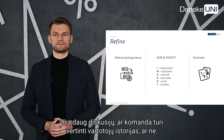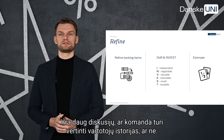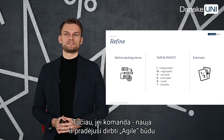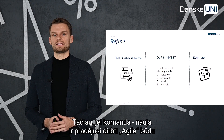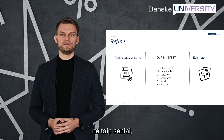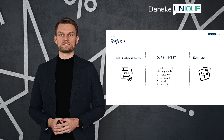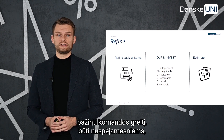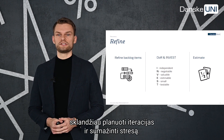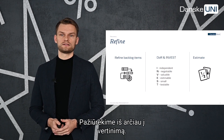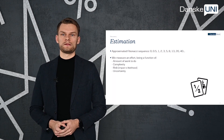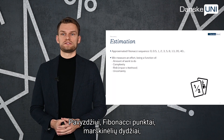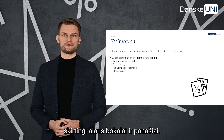There are many debates about whether teams should estimate user stories or not, and there are pros and cons both ways. But if the team is newly formed or has started working in the Agile way not so long ago, I always recommend estimating backlog items simply because it helps to plan better, to know the team's velocity, to be more predictable, to have smoother iteration planning, and even less stress. There are a number of ways to do it, such as Fibonacci story points, t-shirt sizes, different types of sizing, and many more.